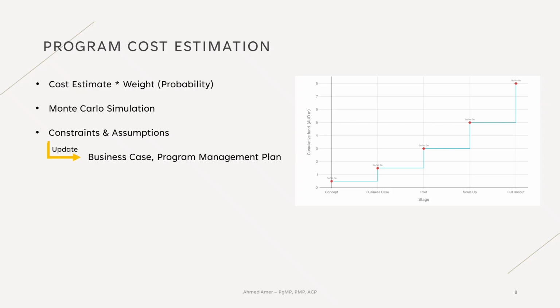And when we talk about program costs, it shouldn't cover development and implementation work only. Decision makers also need to consider sustainment costs. These are the ongoing costs that continue after the program is completed. When you add everything across the full life cycle, including transition and sustainment, you get the total cost of ownership. That total cost of ownership is then compared to the expected benefits of different program options to support funding decisions.